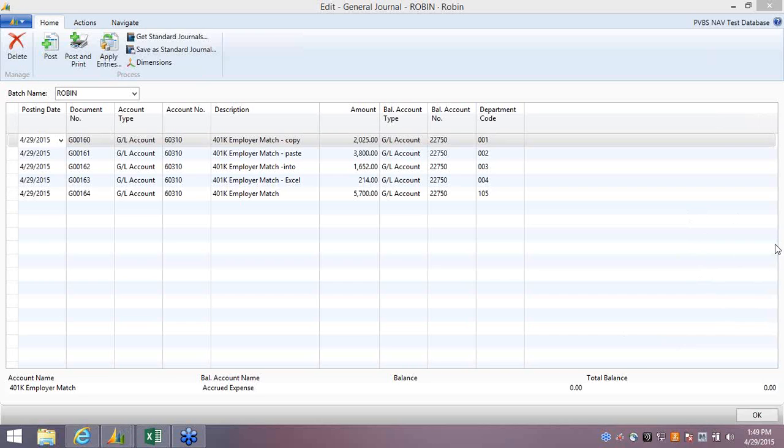One of the questions was, how do you handle retro pay in your job time journal? Again, if it's just retro pay that you're going to do from a costing perspective, Robin showed you the zero-hour adjustment. However, if you need to record retro pay for your cost-plus contracts, you're going to want to reverse out the old pay and re-record it at the new pay rate, because your cost is your price, and that's the basis for all of your fee applications and rates.